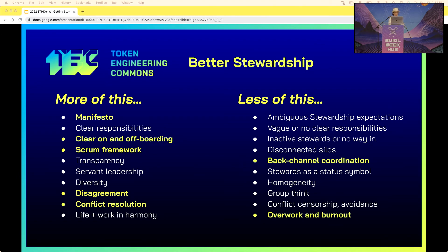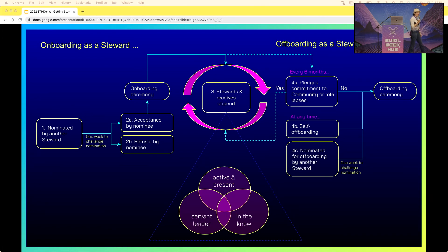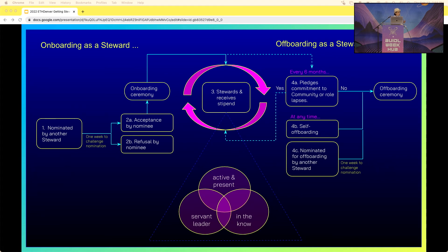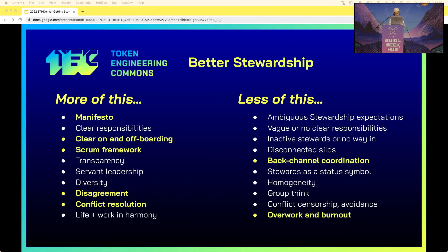Clear on- and off-boarding: onboarding was pretty easy, but off-boarding is hard. People get tied to stewardship as a status and don't want to let go. If they no longer have time, move on to another project, or face a life emergency, they still don't want to relinquish the title. So we made the off-boarding process very gentle, so people can off-board without it feeling like something is being taken away. Less back-channel coordination — it's easy to fall into DMs, but that quickly turns into a game of telephone. We use the Scrum framework: sprint planning, a sprint board where everyone can see the work, and a sprint retrospective to talk about what went well and how to do better.